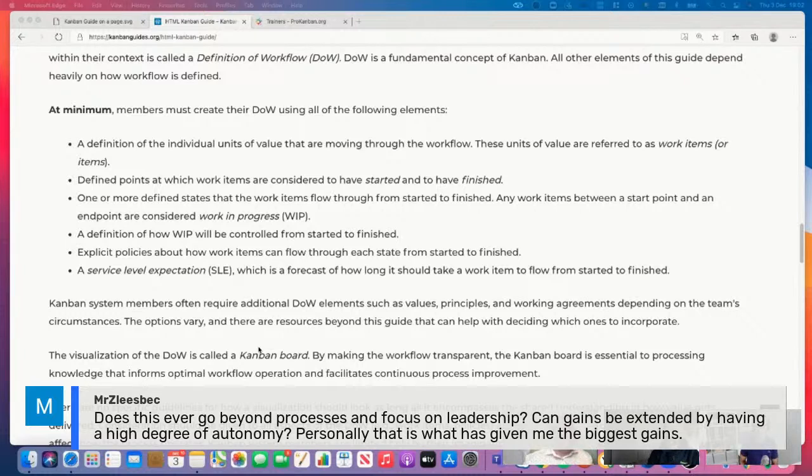In fact, what I'm doing at the moment in my current case, I'm trying to link Kanban boards together in a value stream. So there'll be a cycle time on one board, another cycle time on another board, and there's an overall cycle time. It's absolutely crucial getting this right. And maybe trying to focus on where the team has some kind of span of control, where it's something that they can influence. They can later look at expanding their workflow as they get more influence upstream and more influence downstream. But really trying to get a handle on the work.